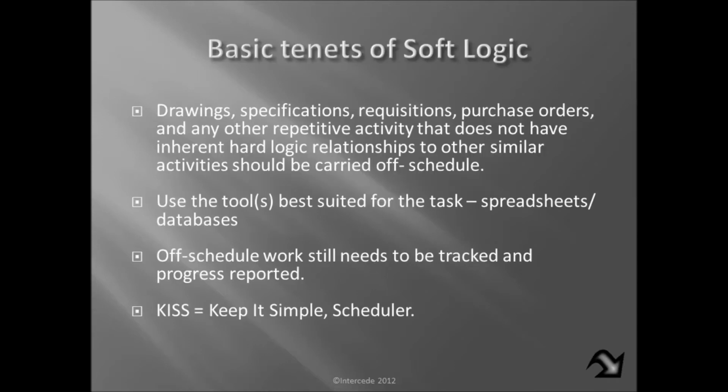The basic tenets of SoftLogic, like we mentioned before, apply to the drawing specifications, requisitions, purchase orders, and now any bulk installation or repetitive activity that does not have an inherent hard logic relationship to other similar activities. These should all be carried off schedule.